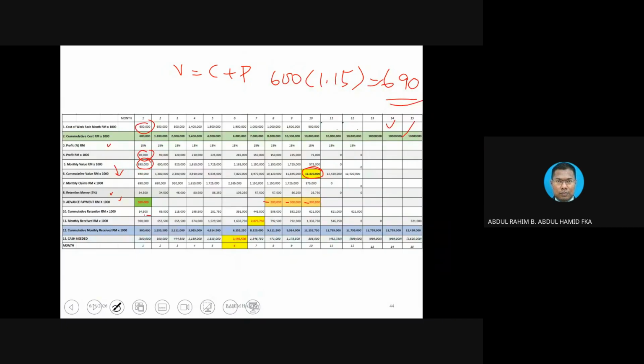Okay, first thing first, this is very important row. How do you get 900,000? Because it is the advance payment being mentioned. And then how do you get 655? Remember, 655 is from the monthly claim. 690, you deduct with retention here, then only you get this amount.